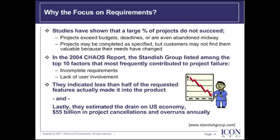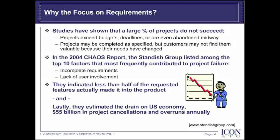I actually believe this is a very important point, because when I say we need to focus on requirements, I'm not condoning a waterfall mentality of gathering all the requirements up front. Rather, I'm condoning the elicitation and capturing of requirements within iterations or sprints. I'm also expressing a need for a lightweight, highly responsive change management program that allows us to adapt to our customers' changing needs, while at the same time understanding the impact to the iteration, sprint, or overall project.